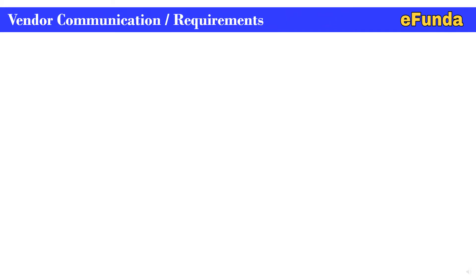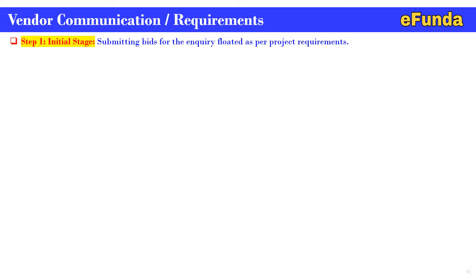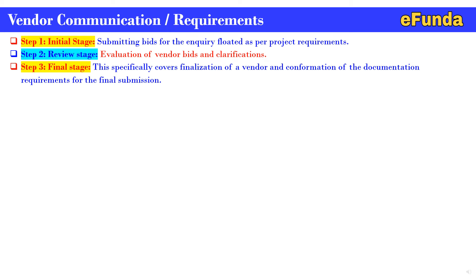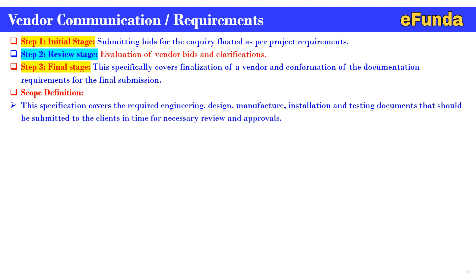Moving on to vendor communication requirements, we will cover the steps for better understanding. Step 1 is the initial stage: submitting bids for the inquiry floated as part of the project. Step 2 is the review stage: evaluation of vendor bids and clarifications. Step 3 is the final stage: finalization of a vendor and confirmation of the documentation requirements for final submissions. This specification covers the required engineering design, manufacture, installation, and testing documents that should be submitted to clients in time for necessary review and approval.